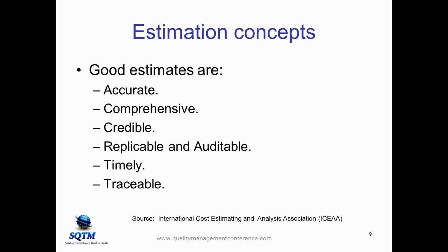We did a deployment where we added this traceability level to the estimates within Procter & Gamble. And what we found is that, without making any rule changes, without any organizational policy changes, they were able to reduce their information technology costs by 30%. The way they did that was the business users could now look at it and say, here's the list of requirements I gave you, here are the costs allocated to each one of those requirements.